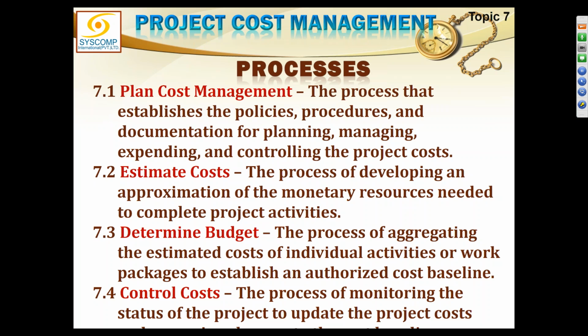Moreover, when somebody is assigning you the budget, it should not be assigned for the project as a whole. It should be assigned down to the activity level. You must have a debate with the person giving the budget about how much budget is for this activity. Or if he is not assigning that, then it is the responsibility of the project manager to ensure that he has a clear picture of how much budget he will be spending for each and every activity.